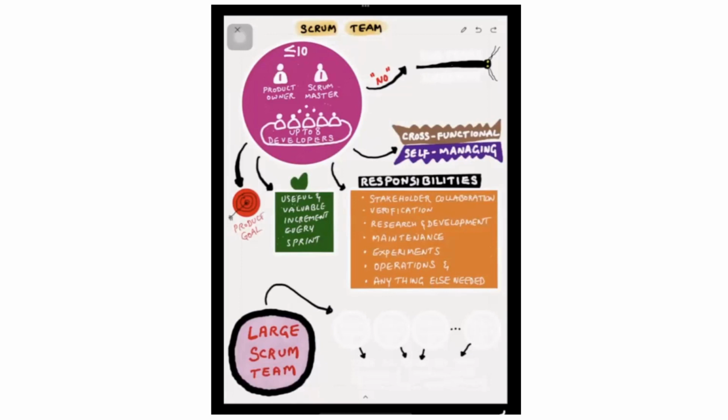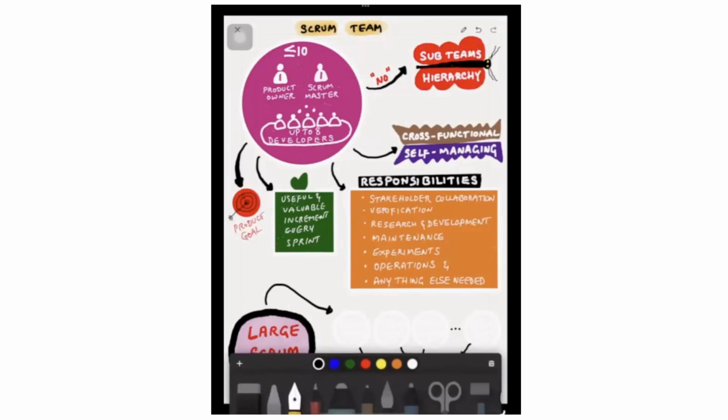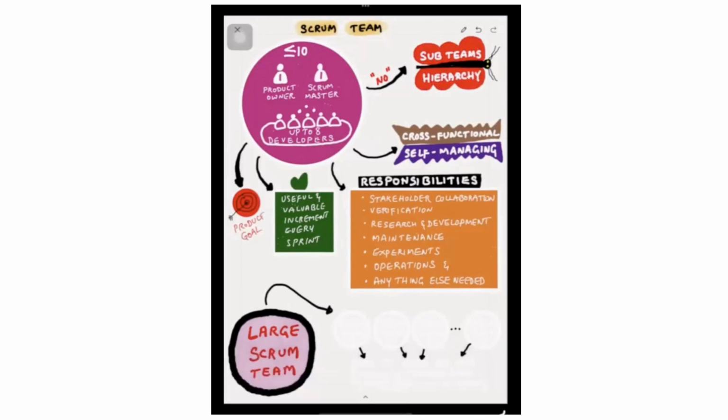Within a Scrum team, there are two things not recognized or recommended. So the first thing is no sub-teams. And the second thing is no hierarchy within the Scrum team. First, let's talk about no sub-teams. So imagine a cricket team. There will be 11-member team in a cricket usually. All the 11-member team should be considered as one single unit. It's not sub teams like 3-4 people into bowling sub team, 3-4 people into batting sub team, and another 3-4 people into fielding and wicket keeping sub team.